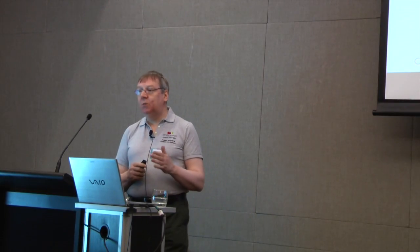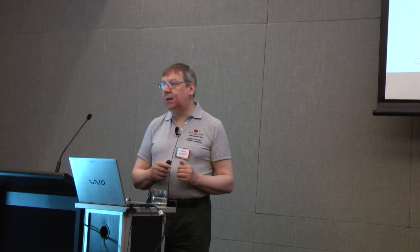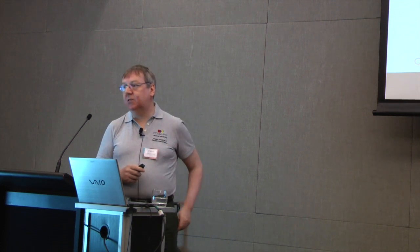One of the problems with Agile, for example, from a procurement point of view, you're never quite sure 100% what you are going to get at the end. In a moment, we'll look at the MoSCoW technique, which is a form of prioritization. But in effect, we always have a view of what must we deliver, what should we deliver, and what could we deliver. And we degrade the shoulds and coulds part of that list to ensure we always deliver the musts.